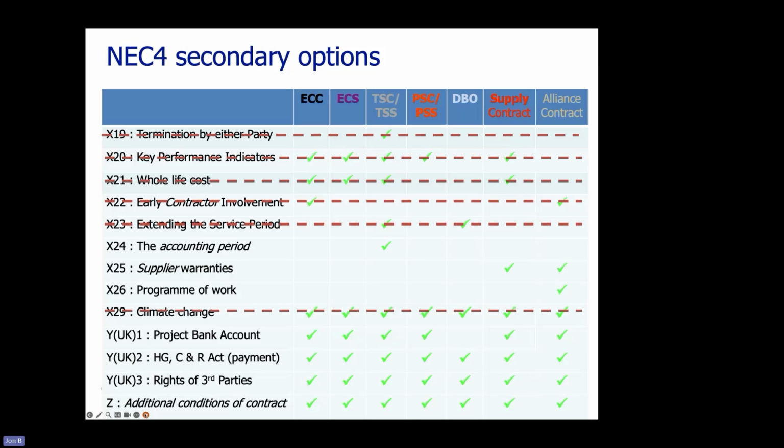Right. And if you're running a competition under procurement law, having that facility in there already complies with, if you like, the reasons for why you're running the competition and the basis for competition, because the service period is such a fundamental of a term service contract that signaling that it can be extended is quite important, is really valuable.